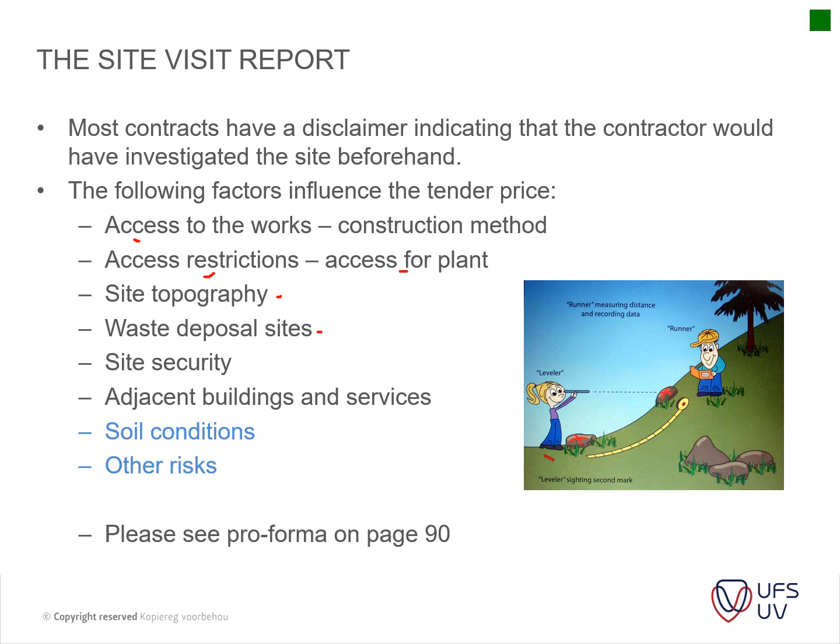And then you've got your site security. Do you have to spend a lot of money on your site security? Is it maybe located within the Joburg CBD? Is it maybe located somewhere where the crime rate isn't that high? So obviously that will influence your security tariff. Is it located on a mine? Is it located in a red zone or orange zone, or a green zone maybe on the mine, which will also influence how you price your P's and G's.